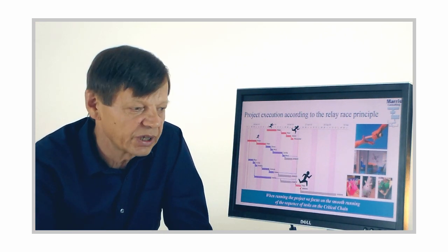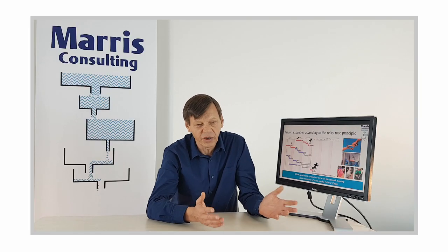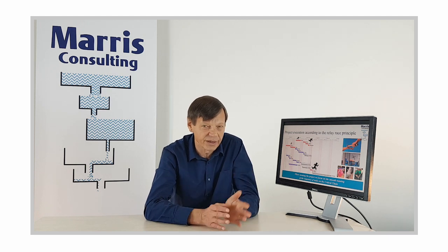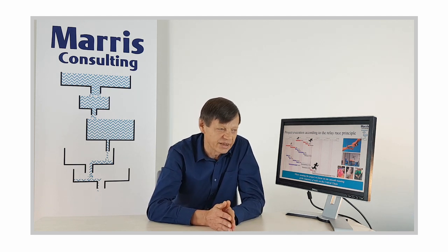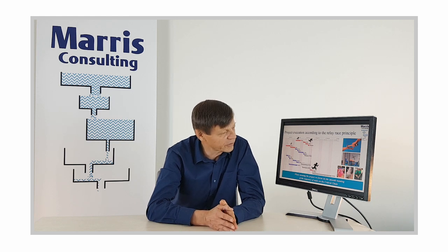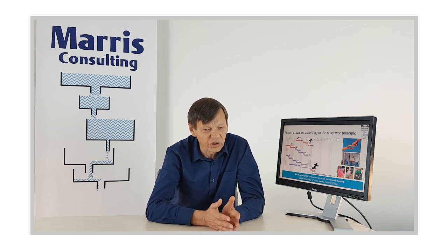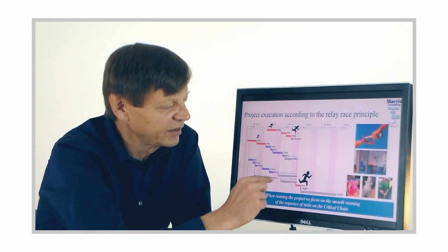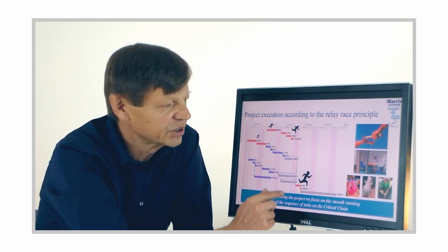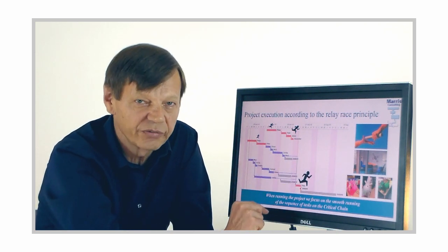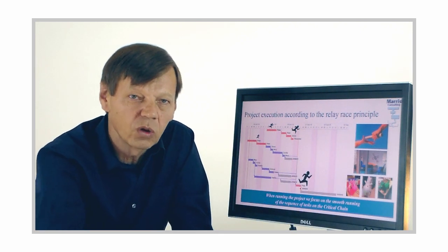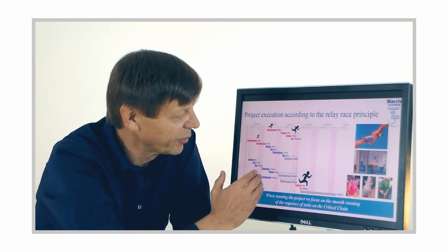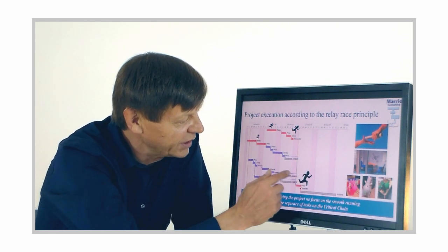To give you an example, we were working recently on a big project for a big part of an aeroplane with 500 engineers working. The project was, of course, overdue and over budget, with everybody screaming all over the place, and we applied critical chain. When we'd done the modelling and worked out what was going on, in fact, the critical chain was being done by a dozen people out of the 500, right? So we had to protect the work of 10 people within 500 to ensure that the project as a whole went properly. And the 490 others, we just had to synchronize their work so that they would be feeding the critical chain